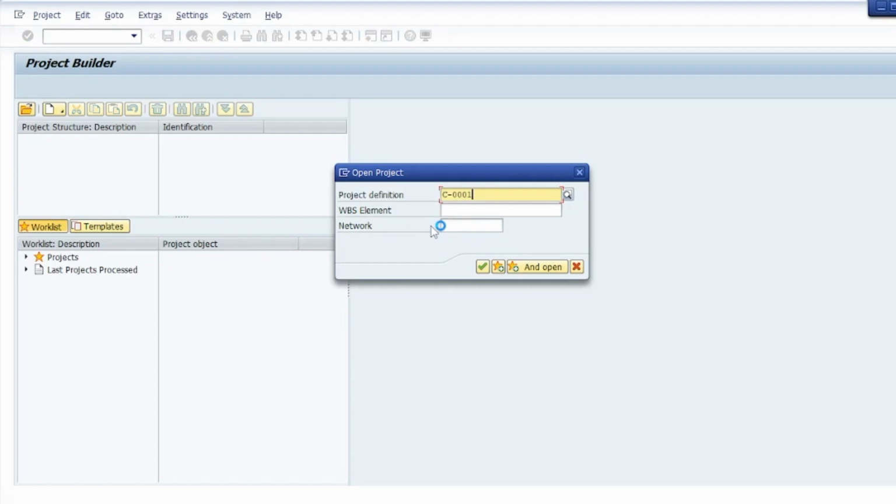So when we open a project or when we look at a project hierarchy, we have basically two aspects of the project. You can even call it one as the header part of the project and then the lower being the line level details of the project. But yeah, the first header part is called project definition, which also holds the org level key details about the project, which will always be the first node of any project. So the first node of any project will be called project definition.